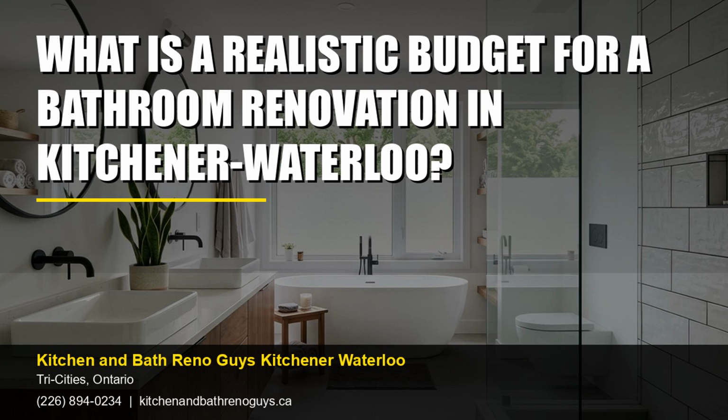Labor costs are another significant factor to consider. Working with experienced contractors can ensure quality workmanship, but it's wise to obtain multiple quotes to ensure competitive pricing. In Kitchener-Waterloo, labor costs might be slightly higher due to demand, especially if specialized skills are required. It's also beneficial to discuss any potential hidden costs up front, such as plumbing or electrical upgrades, which can impact your budget. Set a clear budget before starting and include a contingency of 10 to 15% for unforeseen expenses.